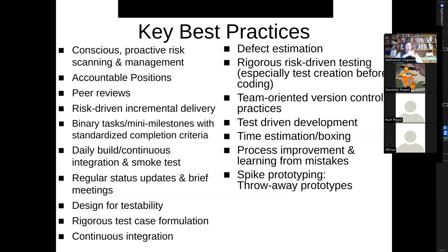Yeah, you get early feedback. You deliver ongoing value. You avoid a big bang, right? You avoid this thing where everyone puts their code together late and it all blows up. Imagine that. And you can estimate in these smaller chunks. It's really easy to fool yourself when you're trying to estimate 3 months, 4 months, 5 months, 1 month. I don't know how long it's going to take. If you break it into smaller pieces, it's actually a lot easier to estimate.